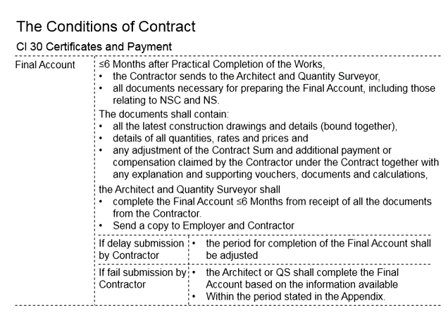There could be minor defects that require rectification, but those are all minor things which can easily be completed. Since the entire project has now practically completed, it is time to conclude the project. The architect and quantity surveyor will need to finalize the final account, especially when it comes to the monetary figures. These are sensitive to both parties, both the employer and the contractor.